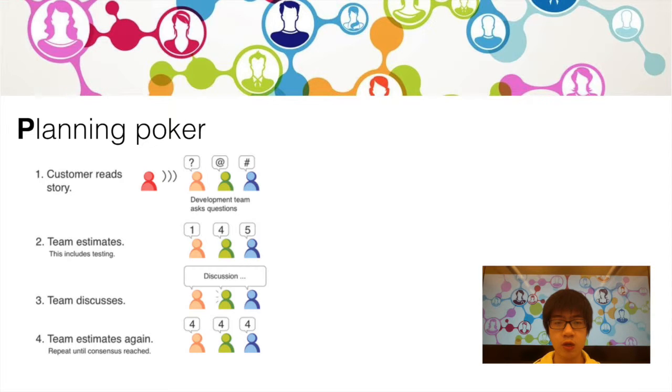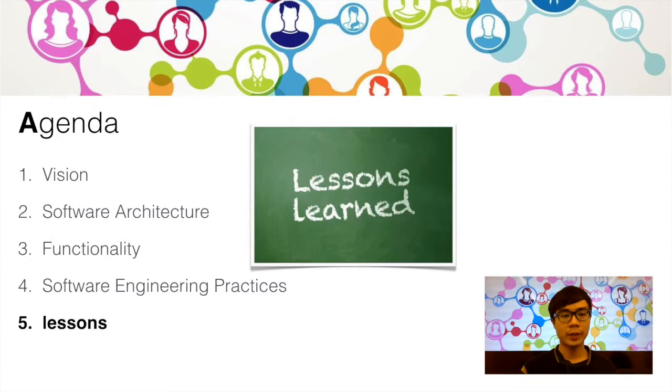We found it very useful that during the planning poker process, teammates would discuss their opinions on use cases intensively. The more we discussed use cases, the more detailed information we found and the deeper we understood them. Good understanding of use cases helped us greatly in the development phase so that we could complete the requirements directly and correctly.